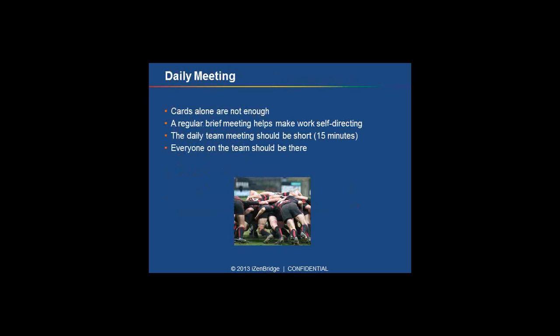Now, especially for software development, just following the card-based approach may not work, and you may need some layer of collaboration among yourselves, and a daily stand-up meeting could add good value. You may meet daily or regularly, maybe twice a day depending upon your work environment, but once a day for 15 minutes is usually recommended for most environments, where everyone involved in your team discusses the progress and the problems they are facing in their work environment. This meeting can also help us preserve the learning.